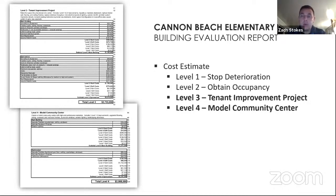When we do a roof replacement and a seismic retrofit, what we'd probably end up doing is disconnecting the canopy, the breezeway in between the two buildings, from the gymnasium, because we want the two buildings, which have different shapes, sizes, heights, and masses, to be able to move differently, because they're going to during an earthquake. So what we'd most likely end up with is a waterproofed seismic gap that's 3 to 6 inches wide in between that canopy and the roof.